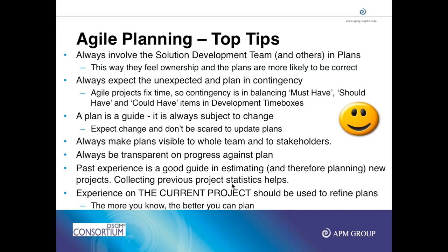Plans are subject to change. You just need to make sure that you recognize the change. If it is to the depth, the teams can decide. If it is to the breadth, then it gets escalated to the visionary. You look at the progress of plans, you see the velocity or the completion status of tasks, and the team productivity, and you can adjust the time boxes.